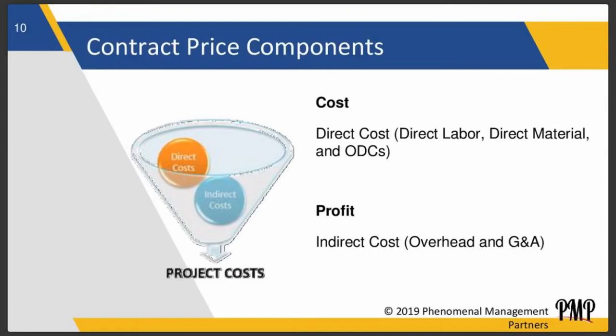Other direct costs are things that just fall out that you don't know. So it's not labor, it's not material, but it's an other direct. An example of that would be something like a piece of paper that you feel is a part of a report that needs to be conveyed in the effort, but it's not material, it's not direct labor, but it's a report, and you printed maybe 1,000 copies of these, and it was in direct support of the report that you're going to submit. That could be an other direct cost because it's something that doesn't fit in any of those other labor categories or categories.